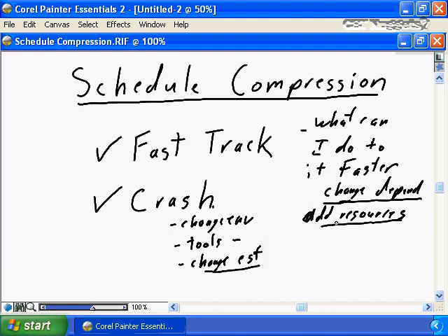Do this only if I truly, honestly believe that if I reduce the estimate for these future tasks, this revised estimate is in fact the likely estimate that will be produced, as opposed to just blindly changing the estimates now to produce a more favorable finish date, only to have the estimates changed again by the team members when they're working on the tasks through the revised ETCs, back to the original date, back to possibly even a more pessimistic finish date.